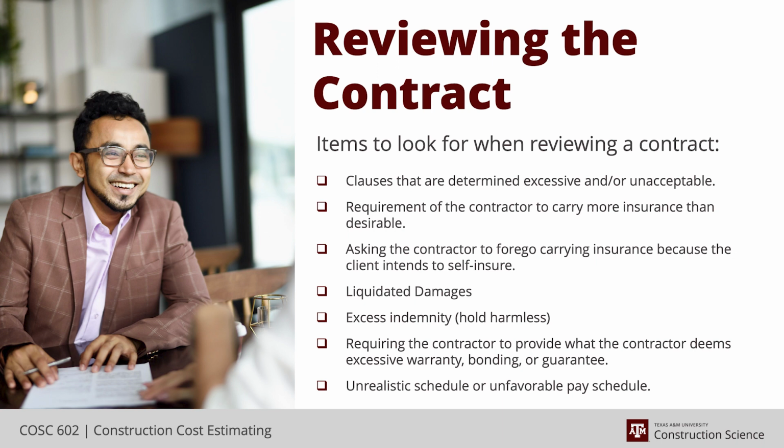Excessive indemnity. I've seen clients basically say, it doesn't matter what happens, you can't hold us harmful for anything, even if they were at fault. And so we had to do a lot of pushing back and say, we're responsible for anything that we do, but that's it. You're responsible for anything other. So that can be a real sticking point. Some of the clients like Air Liquide, Praxair, a lot of the air type companies, are very particular. They have some pretty extensive indemnity clauses in their contracts, and they gave us fits trying to work through them.